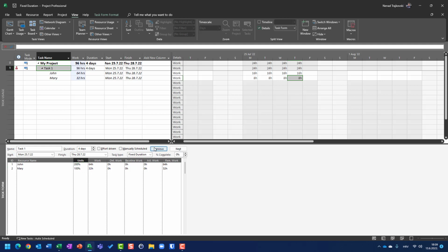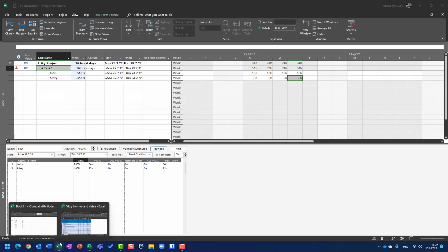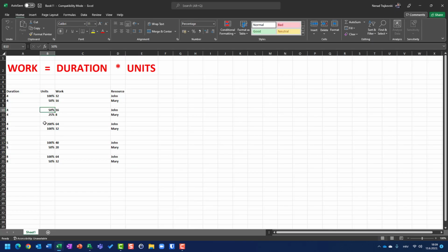I will hit OK, and you will see that John is going to work 4 days multiplied by 8 hours per day, which is 32 hours, multiplied by 200%, which results in 64 hours, and Mary is going to work regularly 100%, which means 8 hours per day.